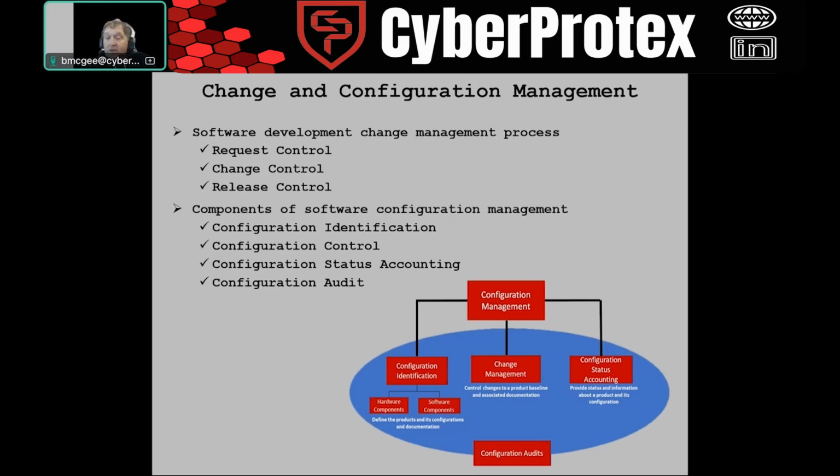One of the questions here, what was the reasoning of using pi? Whenever you're trying to figure out how much something is going to cost, usually, having done this for a little while, you come up with a wrap rate, and that wrap rate is usually like 1.6, 1.7. What they would do is they would always try to highball the estimate to the customer, knowing that if you multiplied it by that specifically 3.14, then they would always be able to beat that estimate.